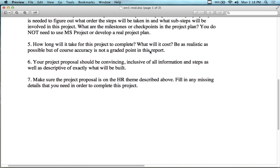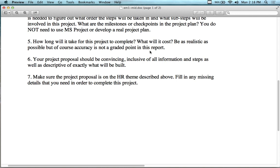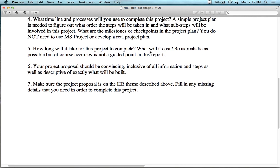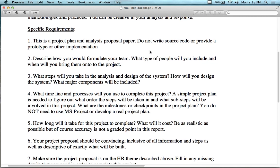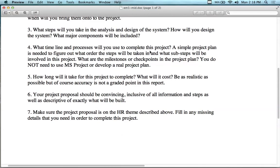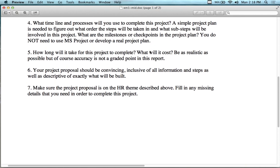You can ramp things up at a certain point and set milestones: by this particular date, we have to have this running, that running, and that running. If not, then we're going to hire a third developer. That's part of your project plan and your planning. Or if we don't test well at a particular point, scrap the project completely — you can put that in there. You can put a Plan B in there that says if we don't get it running, we take route B — route B is outsourcing or something. So be as complete as possible and make up any parameters that are missing.